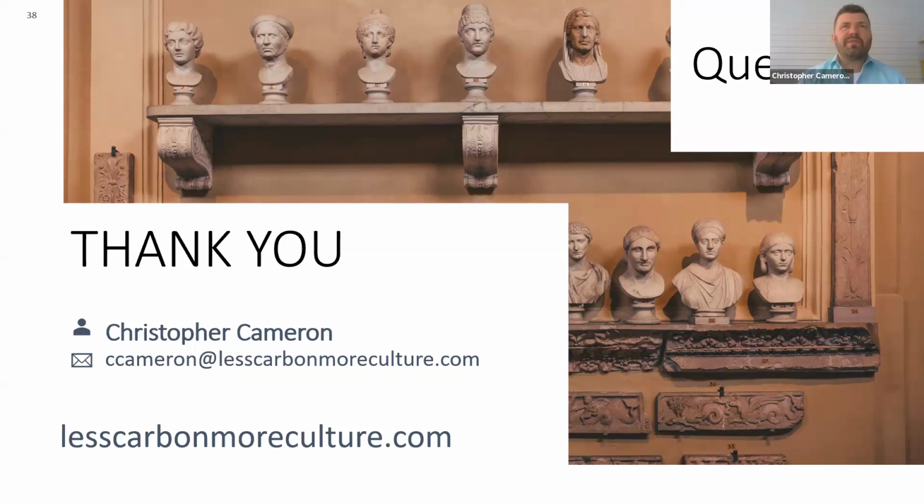So, savings wise, let me couch this carefully. The assessments will run depending on your assessors. Just ballpark average for two assessors, say a collections person and a mechanical person, depending on the assessors, anywhere from 10 to 15,000-ish in that range. Again, a lot of grant programs will cover that. A lot of that's their time and travel, so a lot of the grants will cover that.